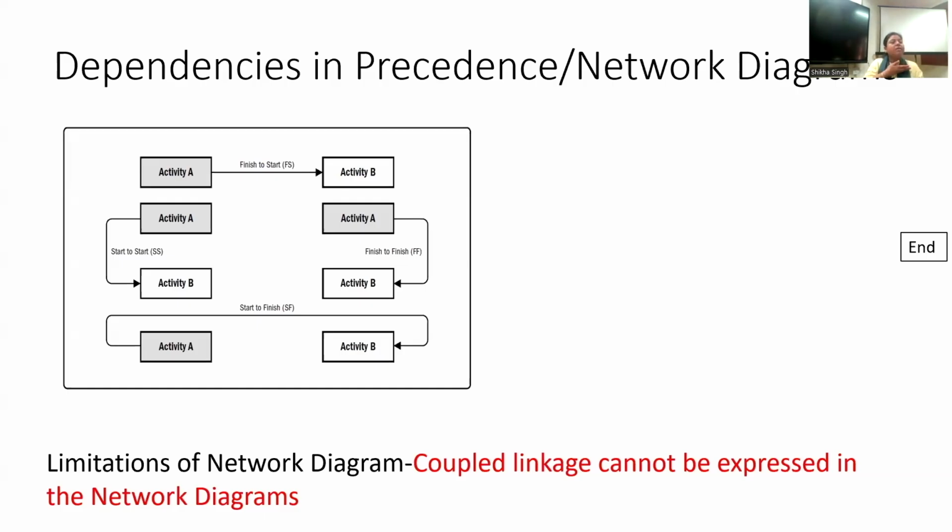We can develop the sequence, so the input to these network diagrams can be developed through DSM. We arrange and sequence all the activities, we find out the dependencies and arrange them in the optimal way. Then only will we be able to develop the further network diagrams. So in DSM, you will see that we'll be breaking the loops, minimizing the interdependencies. We'll arrange in such a way that interdependencies or feedbacks are minimized, right? That optimization, that rearrangement of the activities, we do in the DSM.